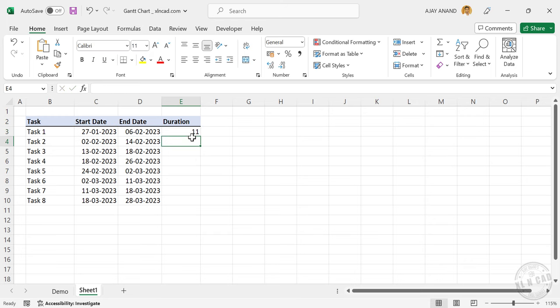Enter formula written 11. So the duration of the activity which starts on 27th of January and ends on 6th of February is 11 days.